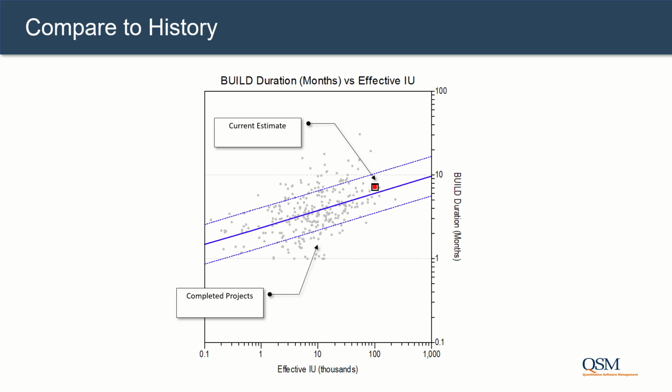Not only is history used as the source of major inputs, ensuring estimates are based on known capabilities, but comparing past performance, both industry and yours, lets you instantly assess whether estimates are reasonable and what assumptions should be challenged. Is the staffing too high or required productivity unattainable? The best practice of gathering your own completed projects lets you adjust key estimate inputs based on averages from your projects and generate a balanced risk solution based on your history.